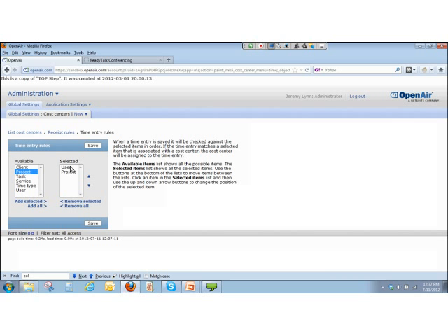A common mistake I see is people putting it in the order of user, project, task. And then they set something on the task, and they set something on the project, and they set something on the user. And what they're expecting is that the last thing there, the most granular thing, which would be the task, would set the cost center. And that's not actually how it works. You would have to reverse this list, basically. So you'd pull it from the task first, and if that's blank, then the project, and if that's blank, then the user. Okay.